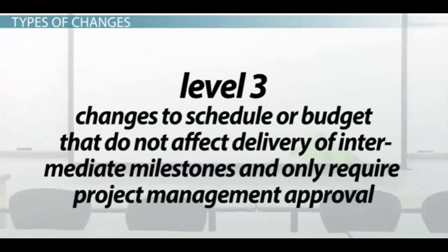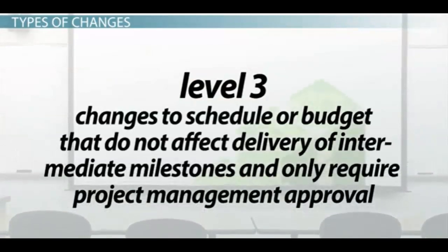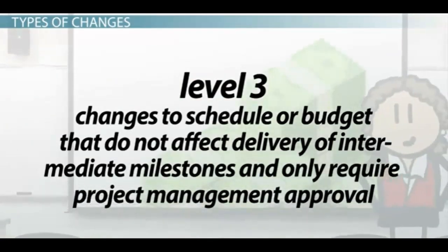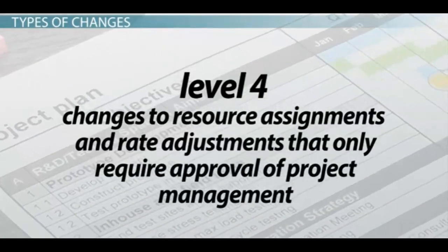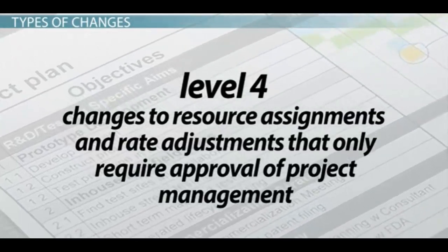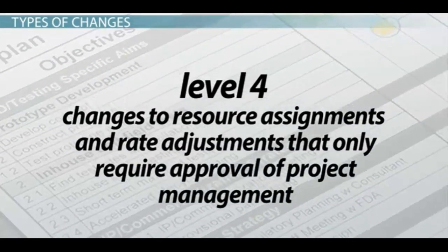Level 3, changes to schedule or budget that do not affect the delivery of intermediate milestones and only require project management approval. And Level 4, changes to resource assignments and rate adjustments that only require approval of project management.